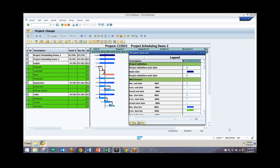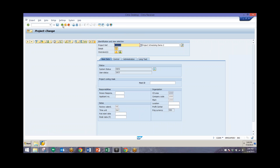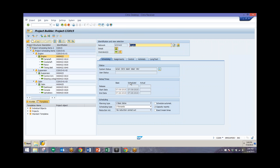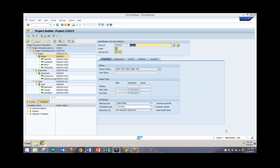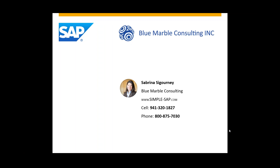Now we can save the project and all of our activities and networks will have been scheduled. You can also do this automatically by making sure the schedule automatically box is ticked — then when you save, it will automatically schedule your activities and networks. That was an overview of Project System Scheduling using the Project Builder. If you have any questions regarding Project Systems or scheduling, please call one of our numbers listed here or visit our website at simple-sap.com.